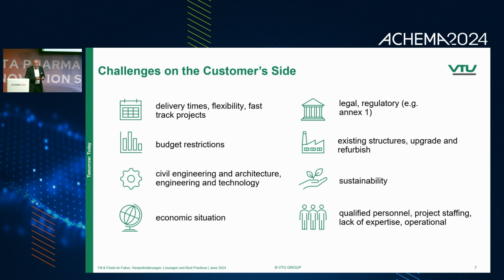Time is always urgent, and nowadays we see at our customers more and more delays in decisions. And the delay in a decision, you see, ends automatically up in problems once it's decided and agreed, because then you have lost time, you have to compensate in the project. So the expectation is that you compensate the 3, 5, 6 months of decision time. You have increased prices if it's 1 year later compared to the cost estimate. So you're immediately in, I would say, a very reasonable challenge in that situation.